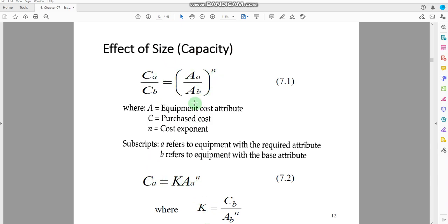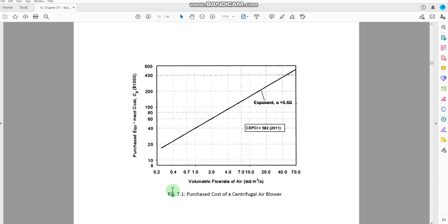So you would be having the same equation here, but we have just introduced one new parameter, which is K, and that represents the cost of equipment along with the capacity of that equipment that was installed in the earlier years. So this is a new equation that we will use to estimate the cost of the equipment. Maybe you can use this equation also, or you can use this equation. The information is the same.